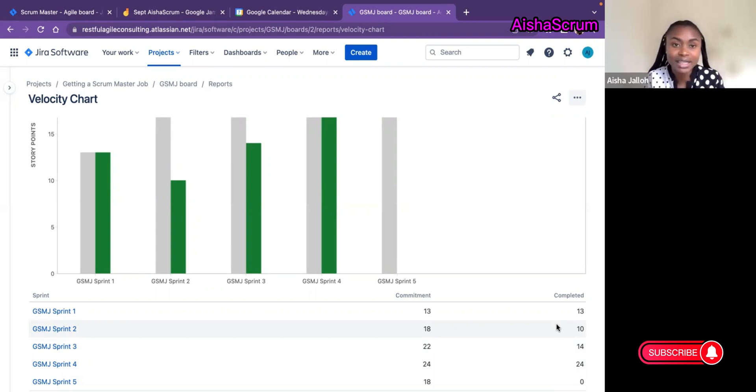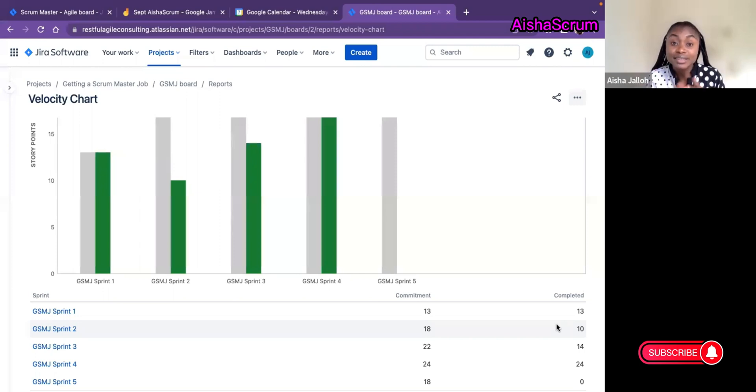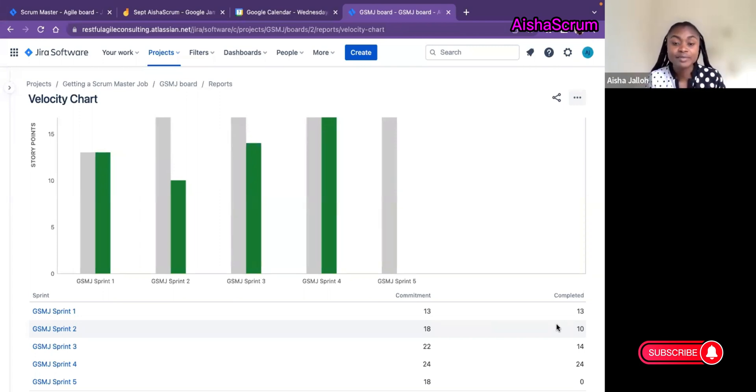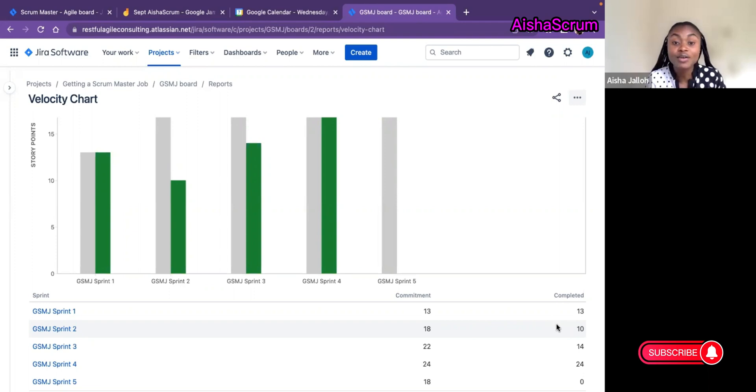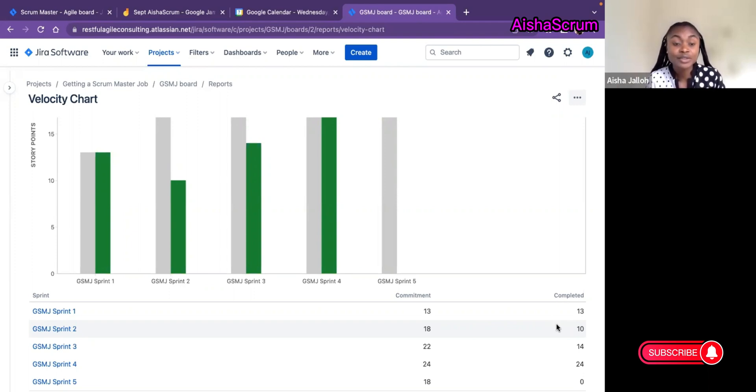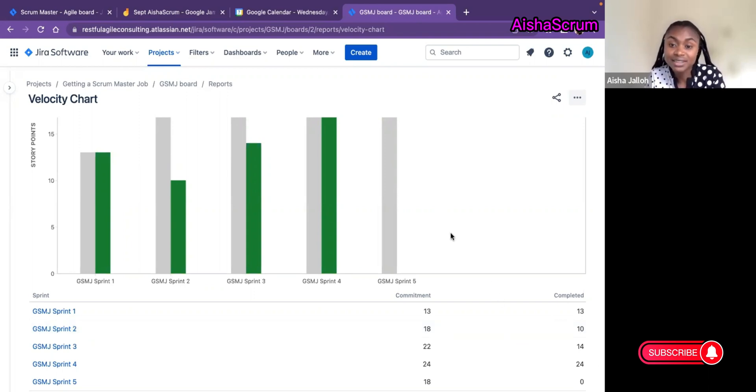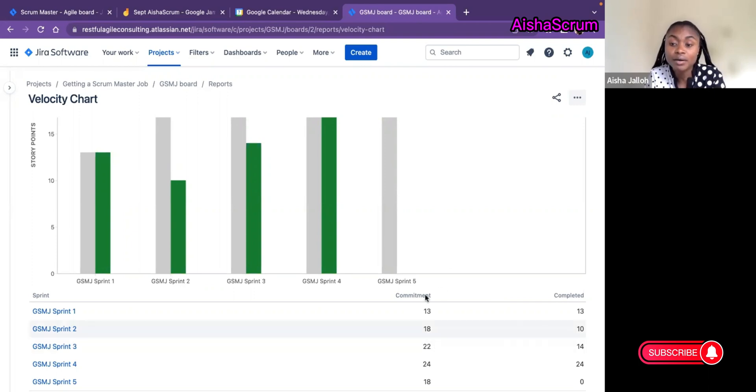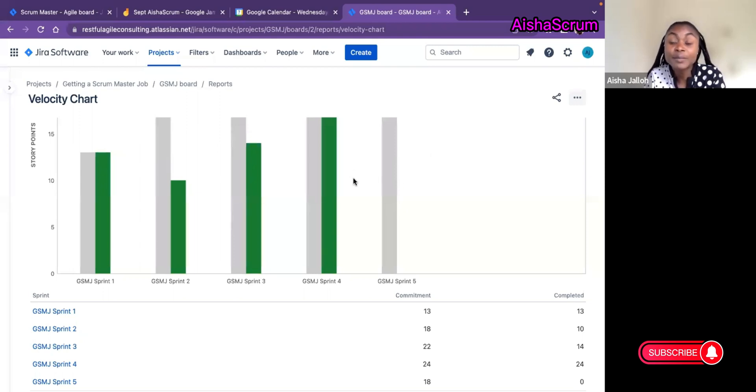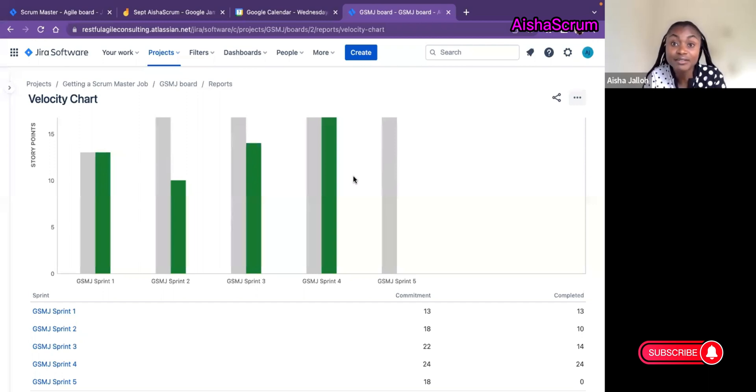Going to my next sprint planning, I will have that in the back of my mind and show this to the team and educate them on it. Hello team, let's talk about velocity, let's talk about how we've been working. Let me show you all and interpret it to the team, because sometimes you can just assume that your team knows about this. So according to our data, according to how we have been doing our work, our current average velocity is 12. I know we do have commitments, we are committing to more than sometimes what we can achieve, but it's very important for us to know that our average, where we can actually start off as a team, is 12.